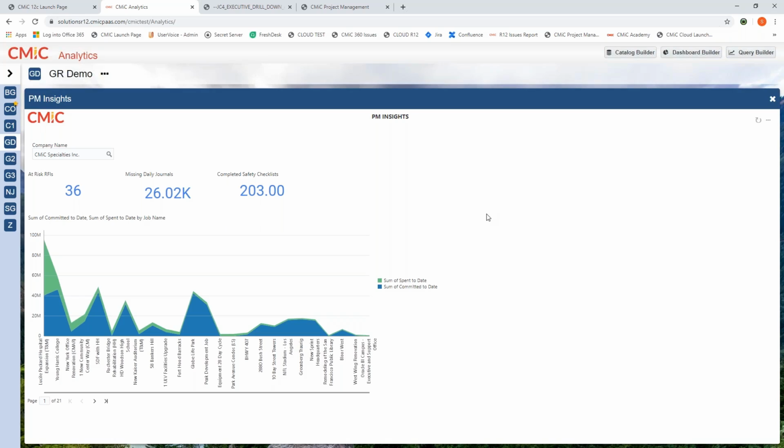But they mentioned that if a project has a lot of RFIs that have been flagged with potential cost impact and no potential change order linked to it, well, if the potential change order isn't in the system, then we're not going to be reviewing that potential change order during our OAC meetings. So we might be on the hook for that RFI change in scope because we haven't properly identified what the financial risk is. So that was a key KPI that they spent a bunch of time creating a report for before they had started using analytics.